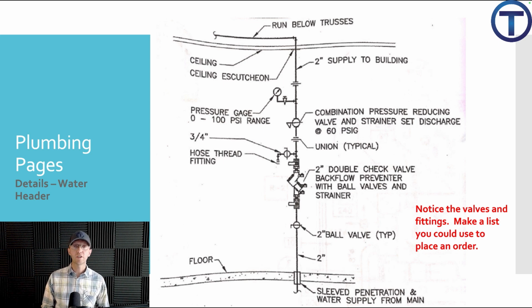This is what you would need to do as a journeyman, as a project manager. You're going to have to go through this thing and detail out, here's exactly what I need. It would be like, hey, tomorrow or next week, we're going to build up this header. So I'm going to list out everything that's needed, all the valves, fittings, adapters, whatever's necessary. Send that over to my supplier and make sure I have those valves and fittings on site when it's time to install.